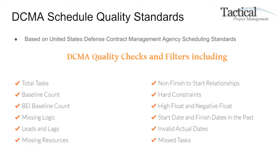All this is based on the United States Defense Contract Management Agency scheduling standards, also known as the DCMA. These quality checks and filters include counts for total tasks, the baseline count, the BEI baseline count, missing logic, leads, lags, missing resources, non-finish-to-start relationships, hard constraints, high float and negative float, start dates and finish dates that are in the past, as well as invalid actual dates and missed tasks. It's important to compare your project schedule to quality standards so you can evaluate the overall health of the project schedule.